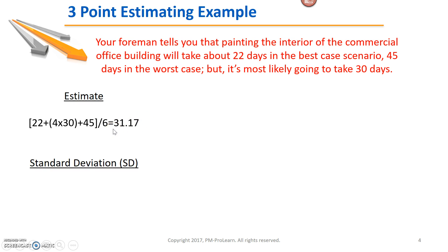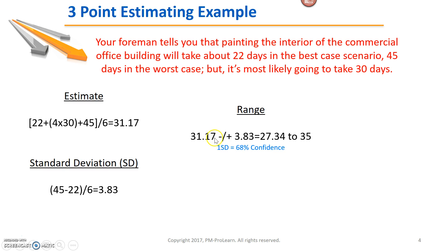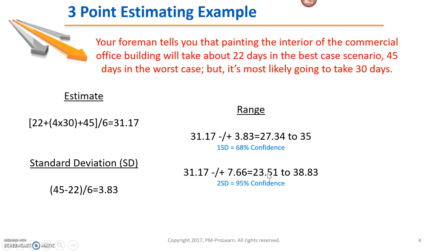Step two is to determine the standard deviation: pessimistic minus optimistic, so 45 minus 22, divided by six — that gives a standard deviation of 3.83. Now to come up with a range, I take my weighted average of 31.17, subtract and add one standard deviation of 3.83, and get a range of 27.34 to 35 days. That one standard deviation gives a 68% confidence level. But if I want greater confidence, I subtract and add two standard deviations: 3.83 times two equals 7.66, and adding and subtracting that from 31.17 gives a bigger range. A bigger target gives greater confidence that I can hit it.